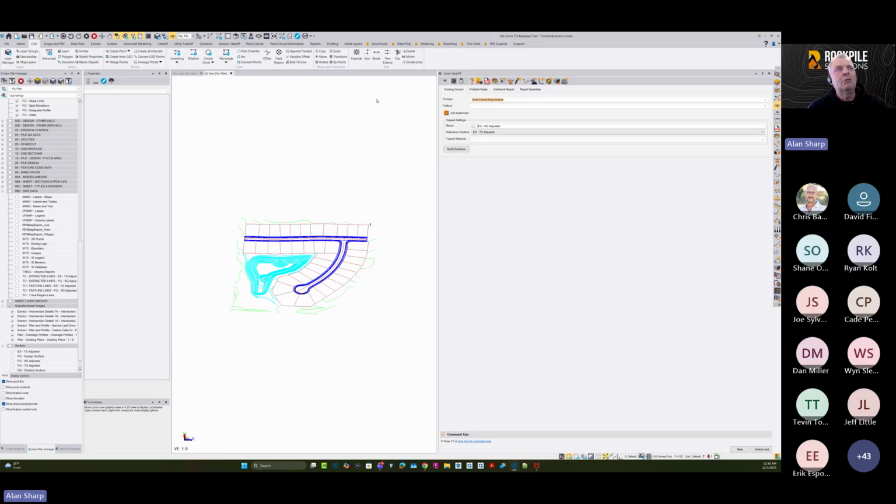So we're going to get rid of some of these process steps that I'm going to show you here. We don't need to build topsoil strip surface. We don't need a specific build demolition. We're just going to build an adjusted existing ground surface, and you can apply demolition and topsoil all at the same time. And you define those just as normal features. So you define an area where you've got topsoil strip, you tell it how thick the strip is, you've got an area you're going to demolish, and you tell it how thick the demolition is.